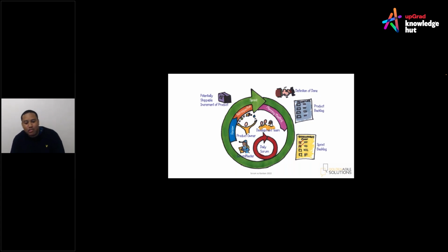Now, this is an interesting one. What is our definition of done? You may have heard the term exit criteria. You might have heard the term entry criteria. And you definitely heard me say definition of ready a few minutes ago. So you've got your definition of ready. Is this product backlog fit for purpose? Is the item that we're putting into our sprint testable? Is the user story clear and there's no ambiguity? Is the requirement signed off by the user?